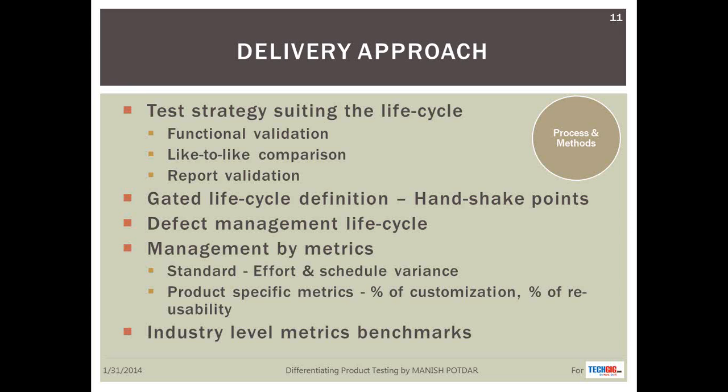How much the product vendor has already tested their product for the bank or for the customer, and the releases, release notes, defect notes, or the traceability of it would actually become a very critical input for how much effort you're going to put in as a testing team.